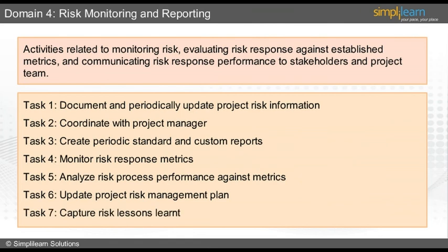The last task is to capture risk lessons learned through comprehensive review of the risk management plan, risk register, risk audits, risk process performance reports, and other reports in order to incorporate them into future risk planning. In the next slide, we will find out the knowledge requirement of this domain.